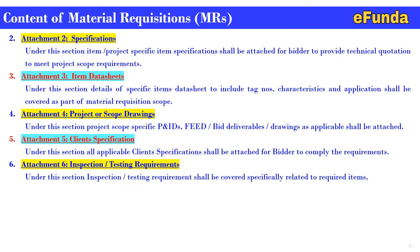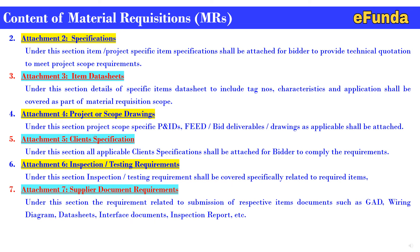Attachment 6 is inspection and testing requirement. Under this section, inspection and testing requirements shall be covered specifically related to the required item — their quality, inspection points, and testing requirements. Attachment 7 is the supplier document register or requirement. Under this section, requirements related to submission of respective item documents such as GAD, wiring diagram, data sheet, interface document, inspection report, dispatch material, etc. will be covered.